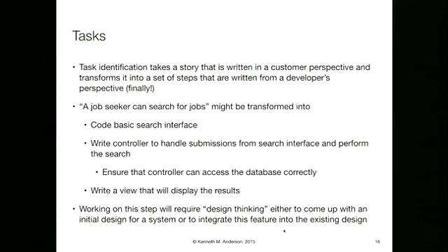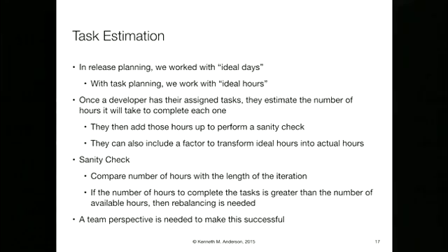Your customer is right there. You could be sketching things on whiteboards to ask questions. You could be asking them what gets changed, what doesn't, all during this task development time. So in release planning, we work with ideal days. With task planning, we work with ideal hours.